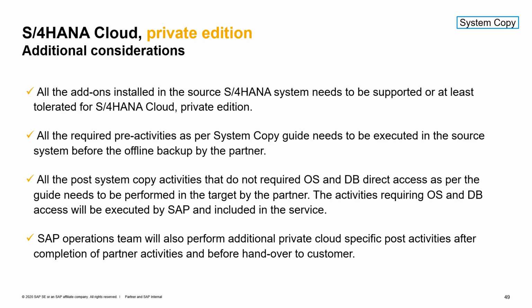The additional considerations for the system copy scenario are, first of all, regarding the add-ons that are installed in the source S4HANA system before the copy. They need to be supported or at least tolerated in the S4HANA Cloud Private Edition, and this will be checked by the operations team after the copy. All the required pre-activities for the system copy will need to be executed according to the guide in the source system before the offline backup by the partner. This is something that we will not be able to check in the target, and that's why we recommend you to pay attention to this point.